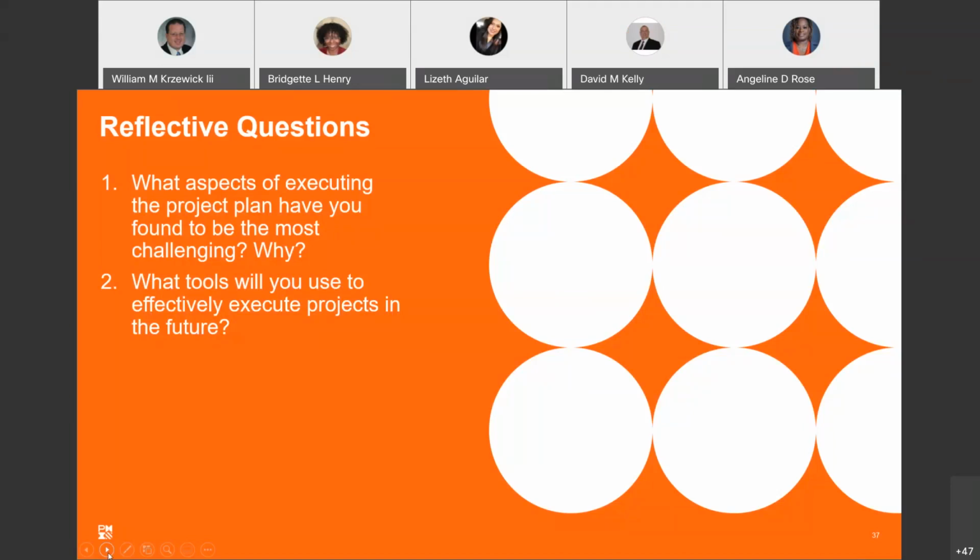And what you don't want is for everyone to expect that the project manager is the one who's going to resolve it, because a lot of times it's in a functional area that the project manager has no control over, right? That's very true. So if you find yourself with an issues log where every issue is owned by the project manager, you might want to rethink your approach.